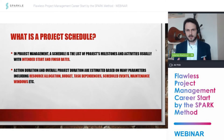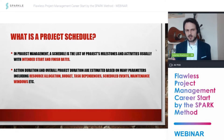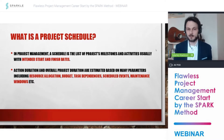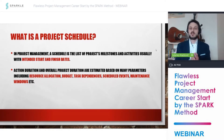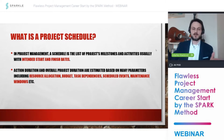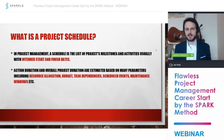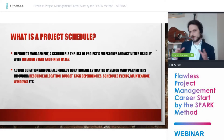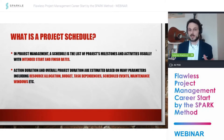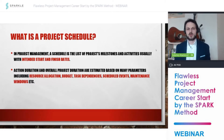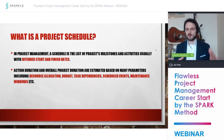Based on many parameters, we create our schedule. It's based on resource allocation — how many people we have and whether they are available. Maybe we can start today, but what if our engineer is only available from Monday? It's also based on budget — can we afford one person to work longer, or only for a shorter time? And there are dependencies, like the foundations and the roof when building a house.